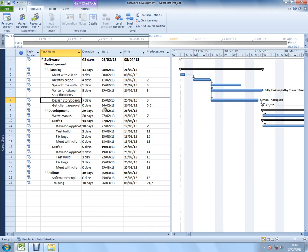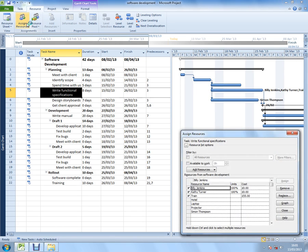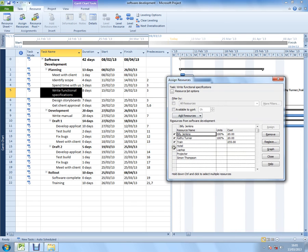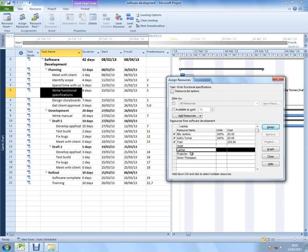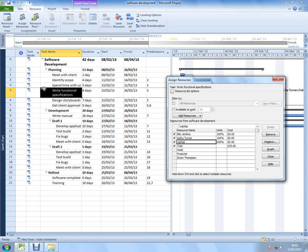Now, if I select write functional specifications again and click on assign resources again, I'm going to select maybe the need of a laptop, which should be set up as a work resource, so I can check its availability. I'm going to assign a laptop. As soon as I do that, I can see in the background that a little triangle has appeared in the corner of write functional specifications.